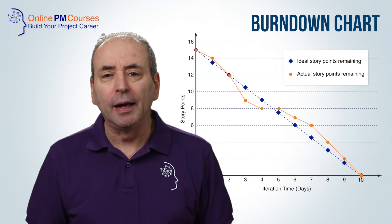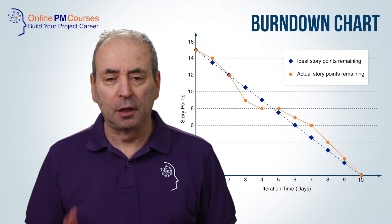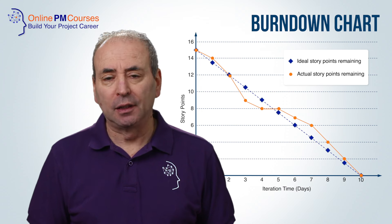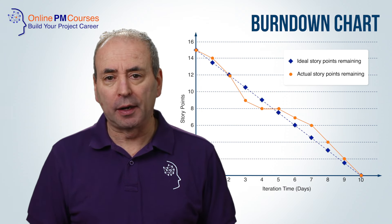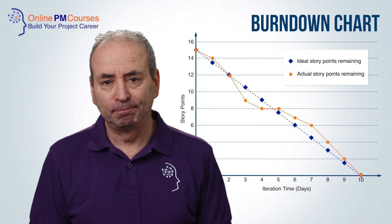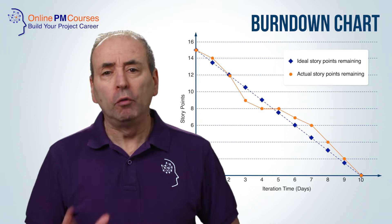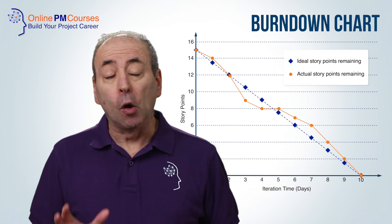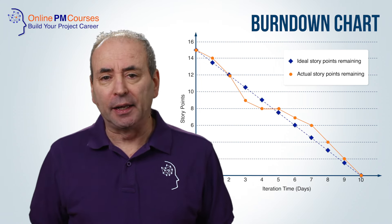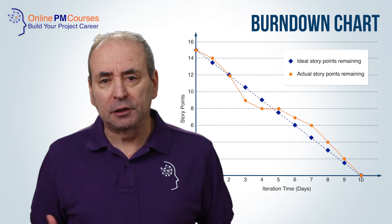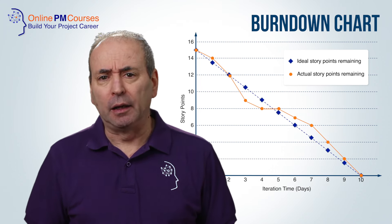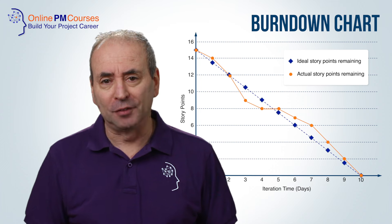Clearly, when we plot the ideal or planned burn curve initially, if we use hours as our estimate for the amount of work, we would expect to see a straight line. When we use story points, and assuming all of our story points are of the same size, we would expect to see either a straight line, or more likely a jagged line that follows the path of a straight line.